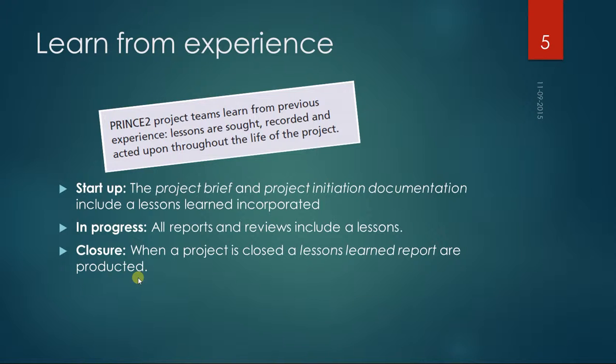and in most of the reports and documents that are produced throughout, there is room for lessons learned, so you can track and capture them all the time. And then of course when you finalize the project, you make a final lessons learned report where you can capture it all. So I think that's a really sound principle.